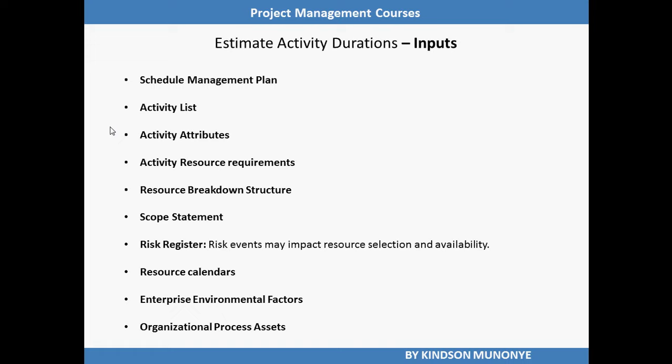Why do we need the resource breakdown structure to estimate activity durations? Because the resource breakdown structure provides a hierarchical structure of the identified resources by resource category and resource type. We also need the project scope statement to estimate activity durations. This is because the assumptions and constraints from the project scope statement are considered when estimating activity durations.